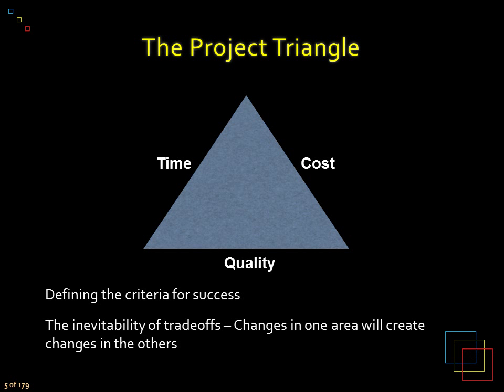You can't have it all. Projects have three major constraints: time, cost, and quality. You can pick two, but you can't have all three. For example, if you want a new information system solution for your reporting process done soon and at low cost, then the quality is also going to go down.